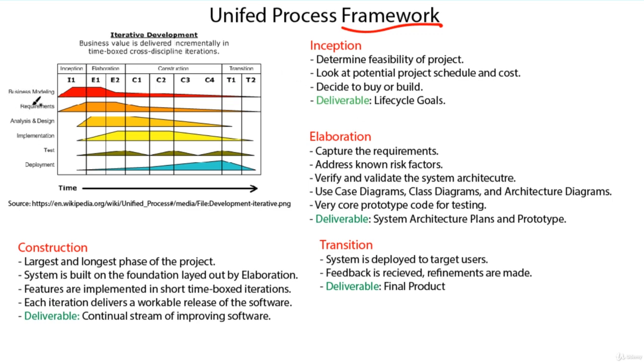And you'll see that we have what we've been talking about this whole time down the left side here. We've got the requirements, the design, the implementation, the test, and the deployment here. And then this idea of business modeling, which is just that idea of costs and people to hire and things like that. And so you'll notice that in the inception phase, we're doing a little bit of requirements, maybe giving a rough sketch of what we're trying to create, but we're really business modeling. We're figuring out, is this something that our company wants to spend the time and the resources to build?